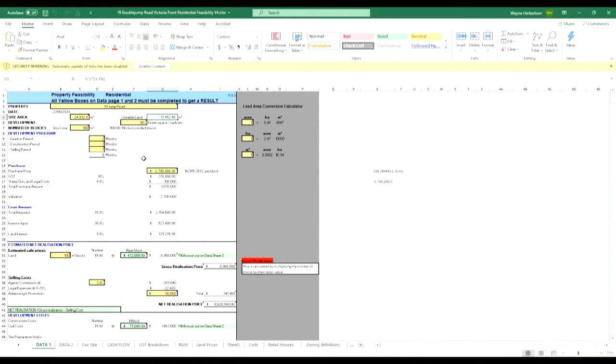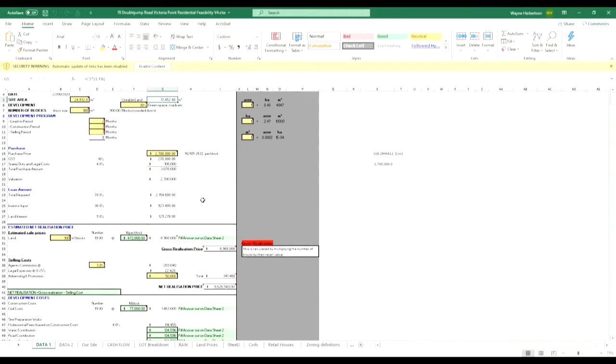So the next thing we look at is the purchase price. And you'll see here the purchase price we've got for this particular block is 2.7 million. The GST on that will be 270,000. The stamp duty on costs is 108,000, and the total purchase amount is 3,078. But you'll see later that they'll get that GST amount back because that's claimable back on their tax. So that'll be a deduction later on. So we'll see how that comes out later. But that's your total purchase price up front.